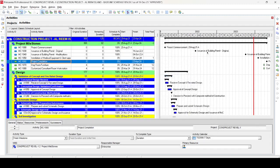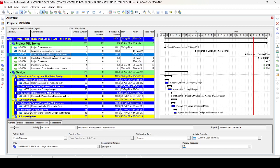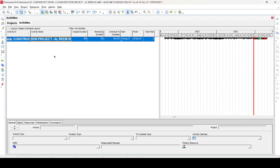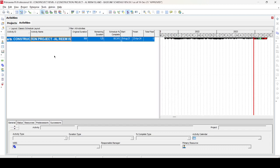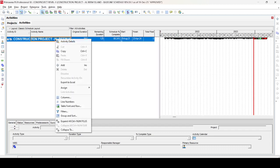Now we want to collapse or summarize the program. There are two ways — I'll show you both. First, select anywhere on the program and press Ctrl and the minus sign to collapse all. Similarly, press Ctrl and the plus sign to expand all. Let's collapse now — press Ctrl and minus, and you can see all projects are now collapsed.